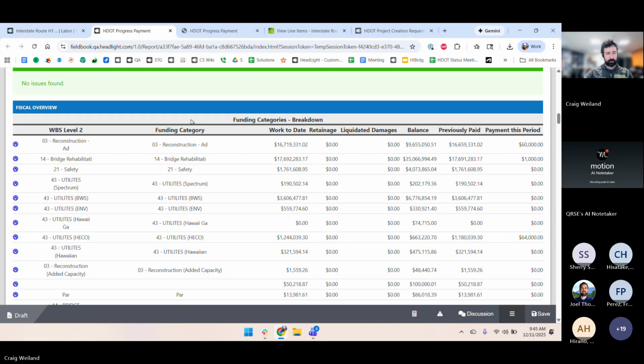So if you're just starting your project and you're unsure of where to find this information, what you'll do is request the bid tab. I think typically you would go through the design coordinator for the project. I think every project usually has one. So just reach out to them and ask them for the bid tab. You could also go through the RE, but make sure you get that information and then you'll be able to populate.